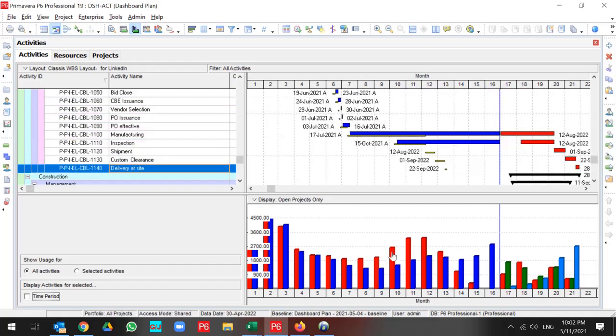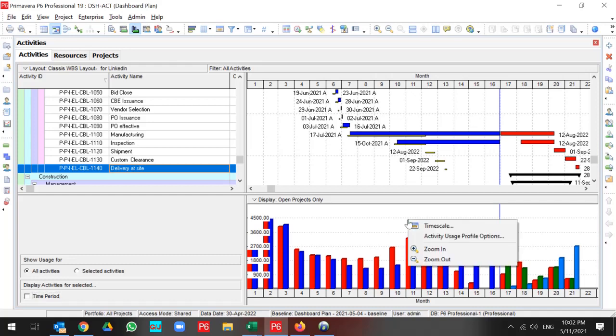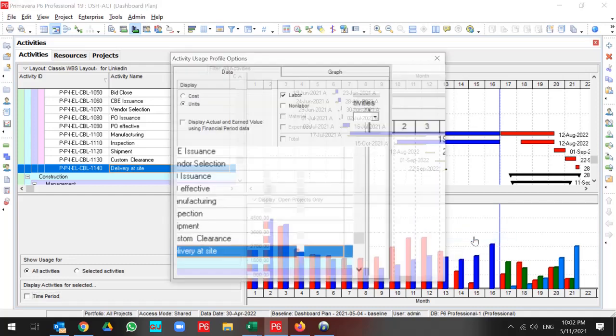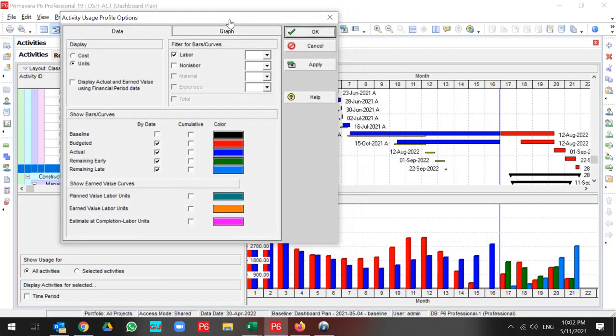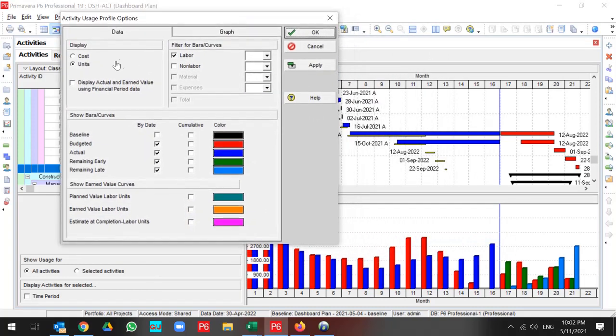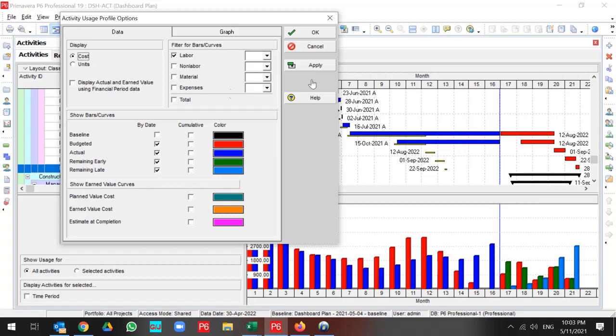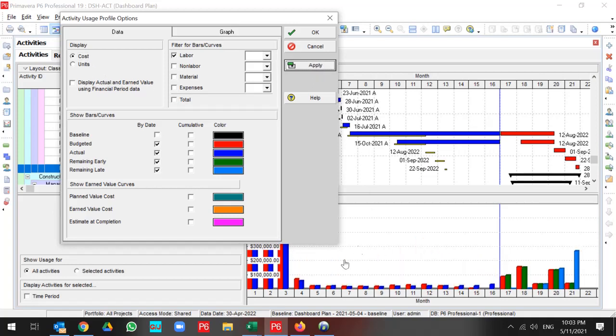But what kind of information can be represented in Activity Usage Profile in the right pane? If you go to Activity Usage Profile option, you have unit and cost. You can toggle on cost instantly and then all the information changes to cost. If I toggle on units, then all the information is related to units.